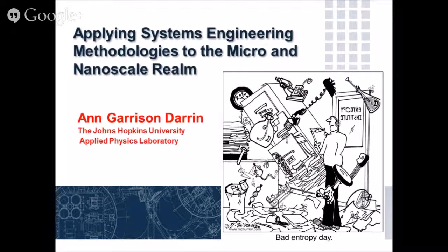It's very interesting. It's a little bit along the lines of one of the things in Agile: build a little bit, test, build a little bit, test, build a little bit, test. And so you're walking both paths of software and hardware with the embedded system approach. When people talk about agile systems engineering and they talk about hardware at all, they're almost always talking embedded systems. When you read the literature, they're talking about a component where they're embedding software in it. It isn't really like the awkwardness that we had, where we're actually building hardware, building software, and having to start to mate it. And we build a little bit, test it, build a little bit more, test it.